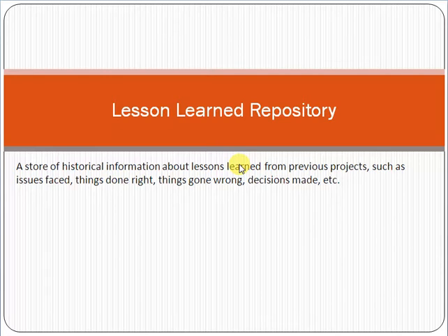Another lesson learned is that whatever cost estimates you have made should be reviewed by experts, persons who have domain knowledge and are specialized in the domain. You should review those cost and time estimates through the experts, and after their historical information and expert opinion, you can finalize the estimates for cost and time.